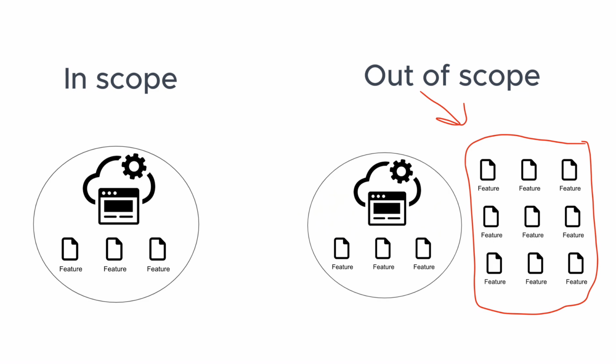For example, once you go through a backlog of tasks and you mark which of them are in scope and which of them are out of scope. This approach can give you a helicopter view of everything that is out of scope. So then you can decide what to do with that. Either just exclude or postpone for future time, or involve extra resources to also complete out of scope tasks.